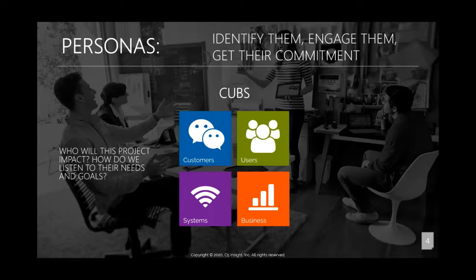So the IT department. Now, I can tell you one thing I see go horribly wrong in these cases is, sometimes the IT department is running this project. They approve the budget, they put the project plan together, they mostly own the requirements, and so on and so forth. Almost never a good idea. Equal and opposite problem. IT has enough to do, and they don't know about this kind of project. So we're going to do this without IT engaged at all. And now the business is working with a partner or on their own, and just doing stuff that later IT gets engaged in and has to pick up the pieces and fix it.